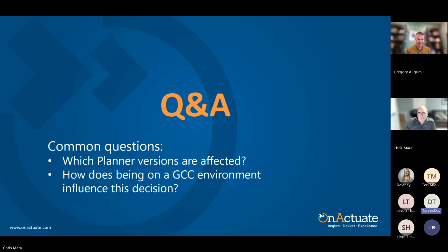I could be wrong, which is why I was asking questions about templates. We have some standard templates for requests for offers, requests for applications, and requests for proposals, with a standard set schedule of how it should go and how long each step should last, and we can use those to gauge performance. How well did this procurement go?